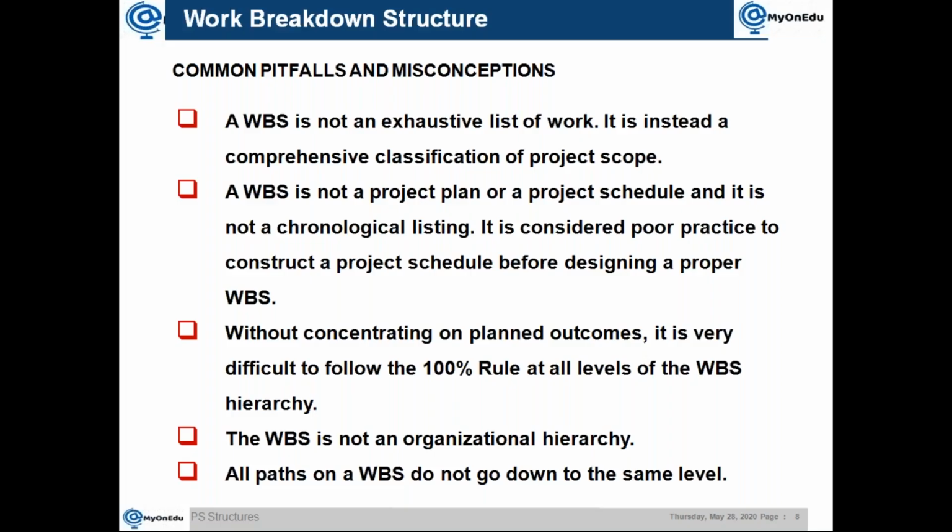So why we have this misconception is, I don't know if any of you are working in MS Project, because in MS Project there is no concept called a WBS. It is all task, summary task and task. So basically people call the task also a WBS element. Actually, you can consider the summary task as a WBS element equivalent in MS Project, but it is not the case.